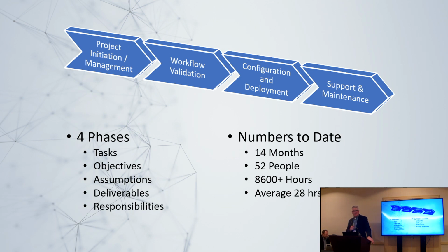Numbers to date, it took us 14 months. 52 people were on the implementation team, including EnvisionCAD. And we spent 8,600 hours specifically dedicated to this implementation, which averaged out to roughly 28 hours per day, spread across those 52 people.